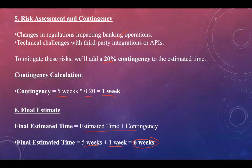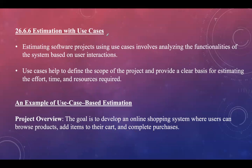Another estimation type is use case-based estimation. We've seen product-based, process-based, and function point estimation; now we look at use case estimation. Estimating software projects using use cases involves analyzing system functionalities based on how users interact with the system. Use cases help define the project scope and provide a clear basis for estimating effort, time, and resources. For example, the goal is to develop an online shopping system where users can browse products, add items to their cart, and complete purchases — three modules total.